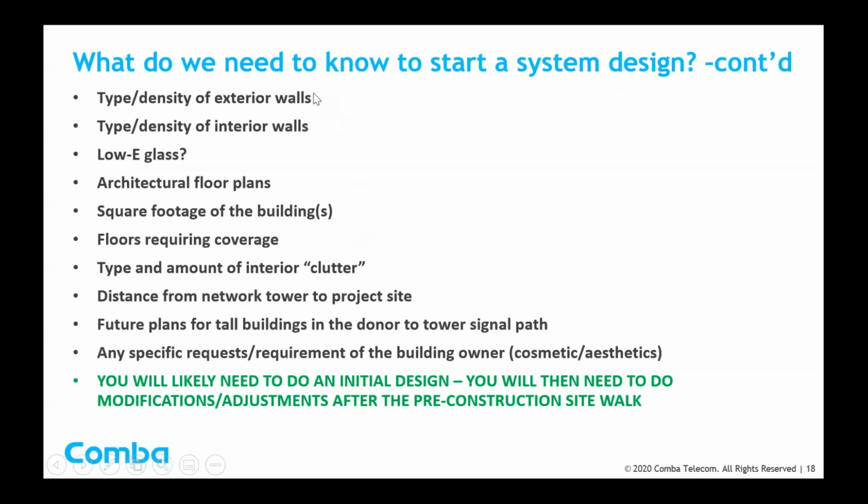The type and the density of the exterior walls. The type and the density of the interior walls. You know, if it's a hospital, are there lead-lined rooms? You need to know that because nothing goes through lead. Are the walls sheetrock construction? Are they metal studs? Are they wooden studs? You need to find these things out.